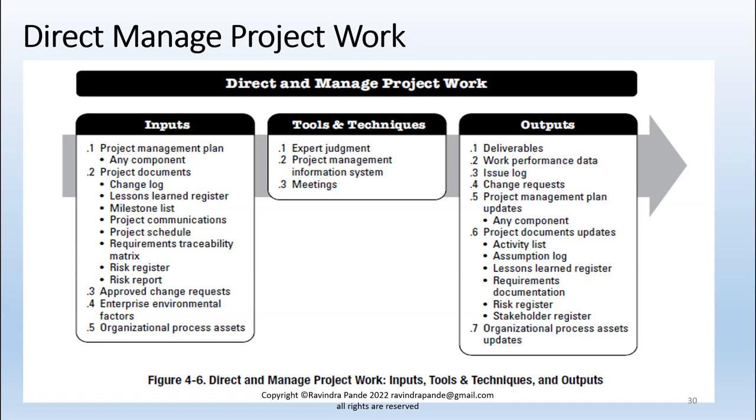So after that, I'll include it in the relevant sprint as guided by the change control board. Now, the change control board is a single-member or multi-member team, constituted of very senior managers who might be from a CME, COE, or SME block as well. So they guide us to adopt or reject any changes. Yes, rejection is also one of their authorities, to reject any change suggested by the client as well. Because there are various types of revenue models we use for a given project.